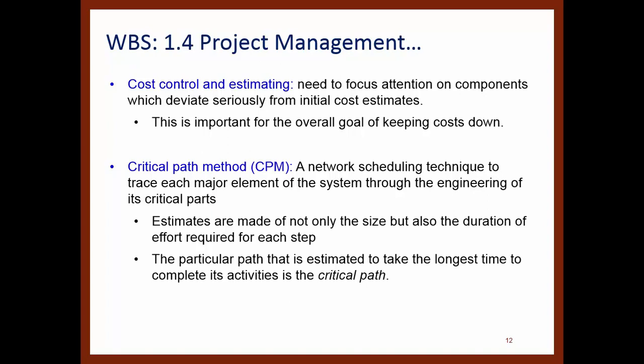The critical path method. Are you familiar with the critical path method? Basically, it's a network scheduling technique that allows you to trace the major elements of the system through the engineering critical path. So you have all the activities, you have the lead times, you have the production time that it's going to take you to complete each one of these activities, and based on that, you can trace back the longest time that you will need to complete the project.